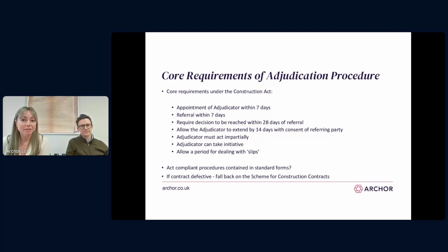This is because, as I've said at step 2, the referral notice needs to be served within 7 days of the notice of adjudication. Now, this 7-day period can't be extended even if both parties consent to it. The adjudicator's decision needs to be delivered within 28 days of the referral. And as Liam's already said, this period can be extended and commonly is. So for an extension of up to 14 days, the referring party's consent alone is required. For anything longer than this, the consent of both parties is needed.